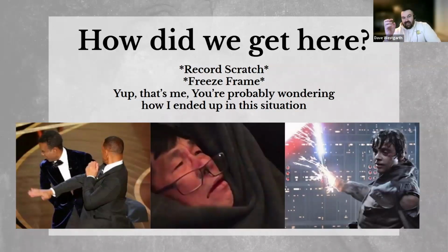This is sort of the crux of this framework or this idea for an Agile professional. First of all, we start by understanding what our team's wants and needs are. We then categorize based on our iteration, our sprint, where we think we're landing. And then we do a bit of a root cause analysis. How did we end up at this particular ending? Why are we in a bittersweet ending instead of a sweet one? Why have we ended up at a bitter ending instead of a semi-sweet one?